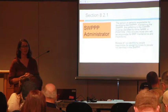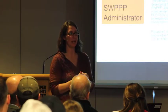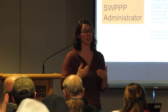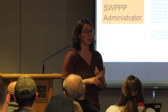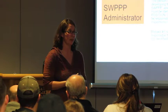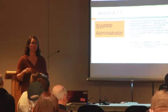That should. I mean, ultimately, it's not gonna come back on your shoulders. I know sometimes they may come back on you and say, hey, but you didn't tell me this. And I get that. That's a level of conversation you have with that contractor, but ultimately, contractors, it's on you. If your consultant gives you the SWIP and says, here are the things you need to do, and you don't bother to read the SWIP or do some of those things, you're gonna be in violation. If you don't know who was designated in your SWIP to conduct inspections, and you're just giving it to whoever walked in off the street yesterday, you're gonna be in violation. So contractors, ultimately, as the permittee, it's on your shoulders. Your consultants are not the permittee.